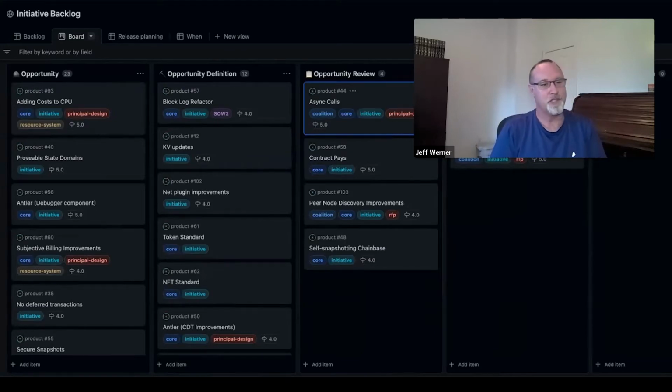And we don't want to do that for everything. We only want to do that for the stuff the executives say, yeah, we think this aligns with our strategic plan. And so there's a couple things in here that we've added in complexity where the opportunity is getting to that kind of one page. We call it a ROM. It's a rough order of magnitude estimate, where we're saying, look, this could be plus or minus 25%. That's a horrible estimate to buy something, but it's at least good enough for our executives to go, all right, it's this size of box.